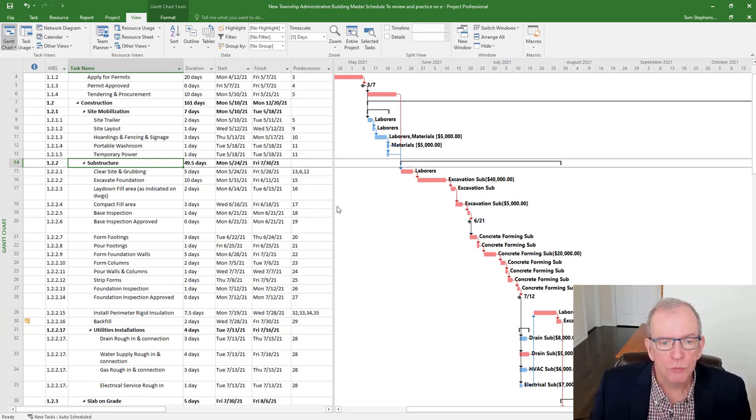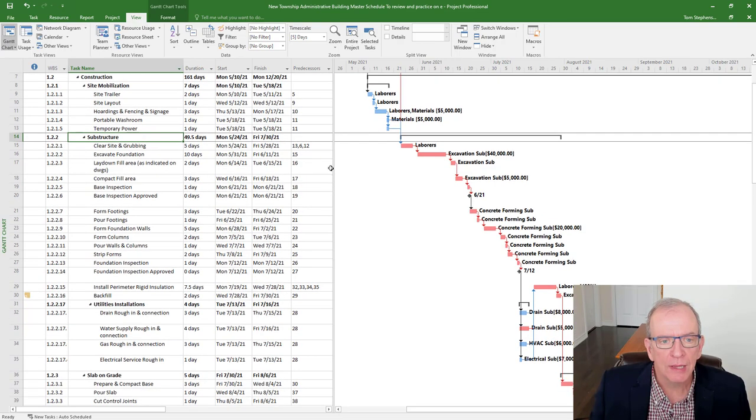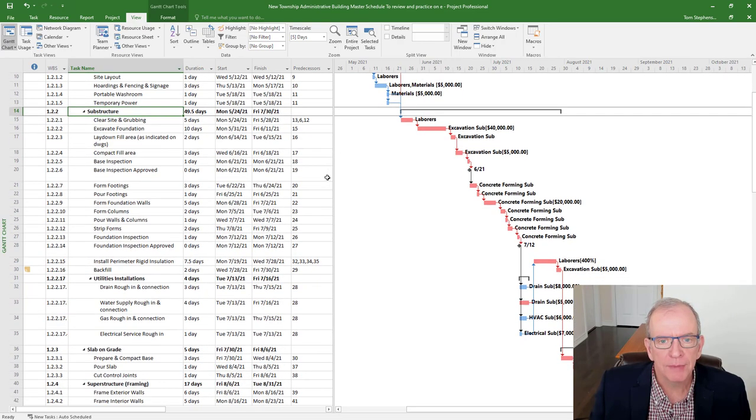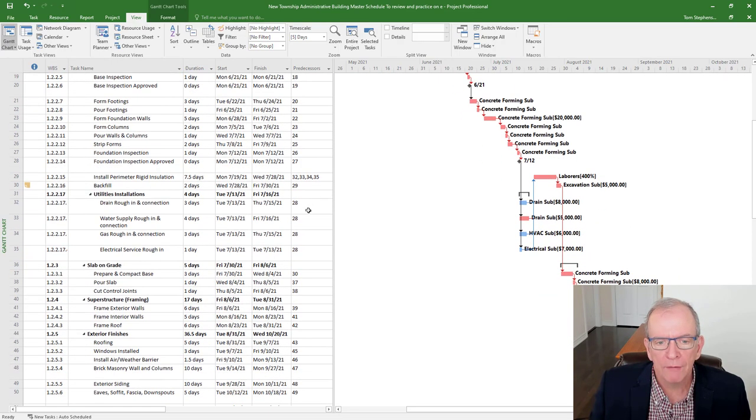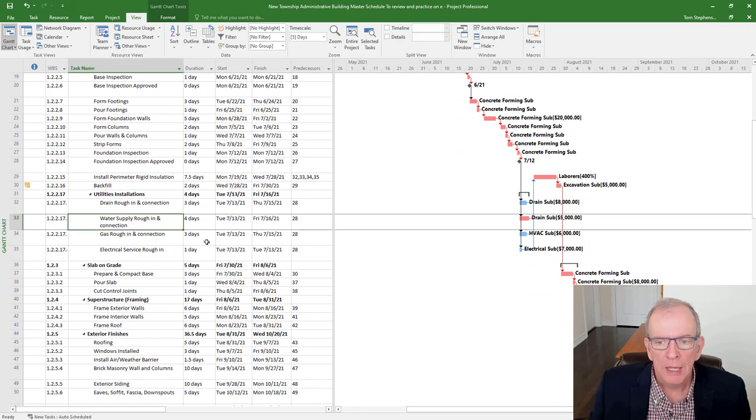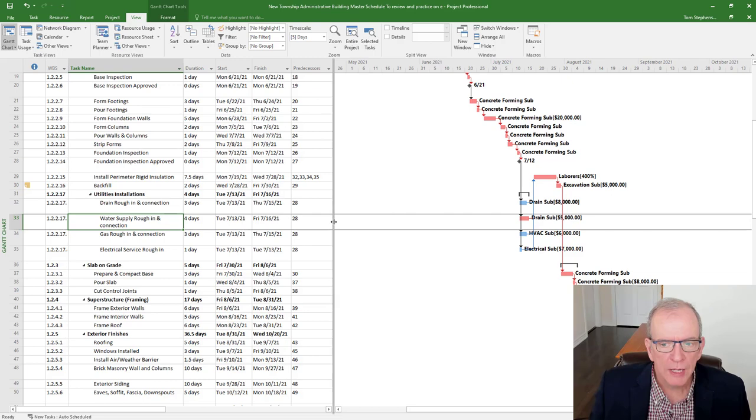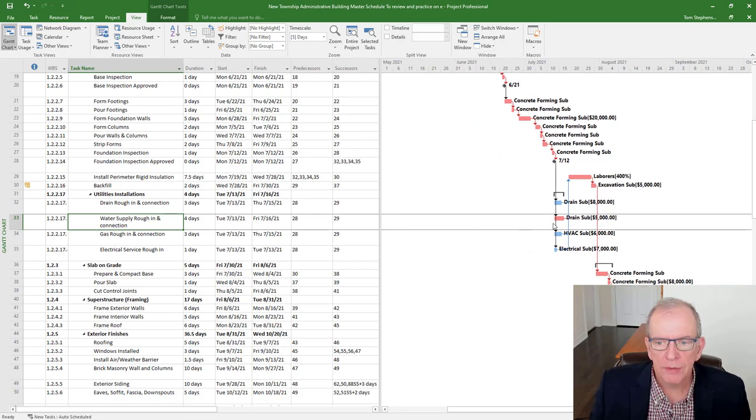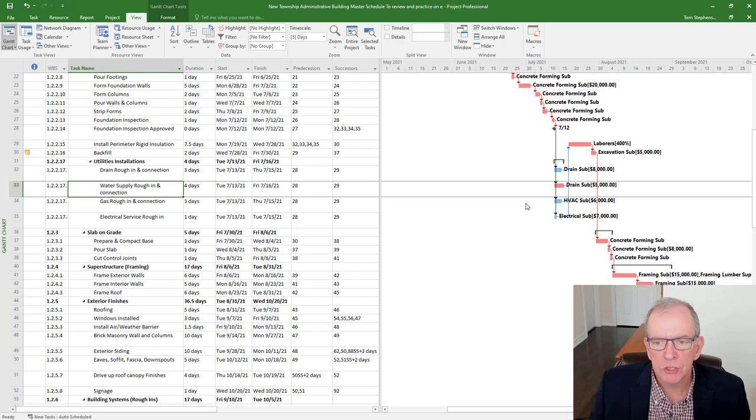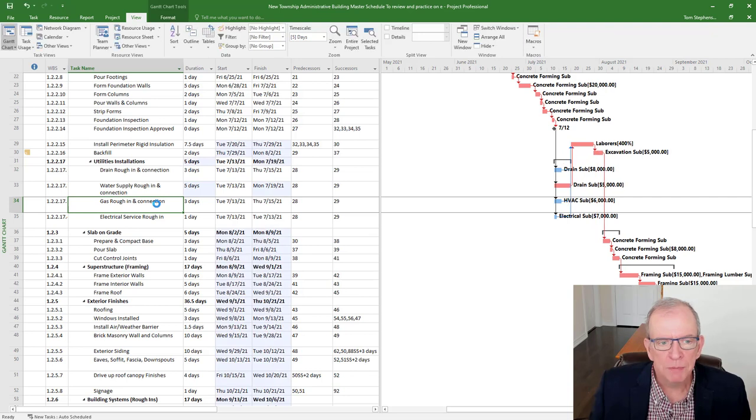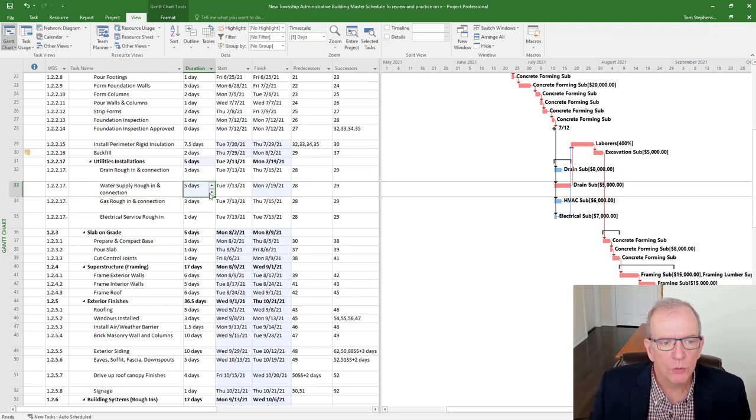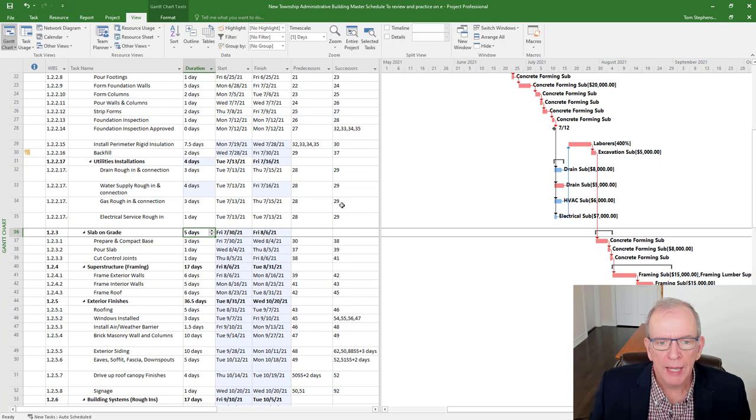Avoid open ends. Well, an open end is where something is not linked to something else, and you want to have it linked. So for example, if I look at this activity here, I've got drain subcon, I've got the drain sub water supply and roughing connection. So I can see that that's critical. And that if I make this take longer, watch, it makes my project take longer, it affects all of those activities there.